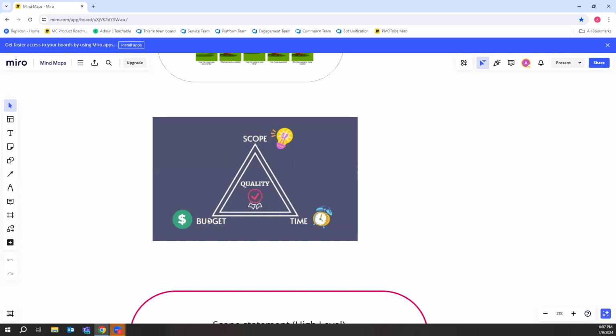Right? That was the scope of the project, and that was not going to change. What happened then was, with all the findings and all the complications they had, the budget increased. I think it was about 9 times more than what initially was estimated, and the time increased by almost a full year. Right. So that's a very good example of a very traditional project that you cannot do any other way. It really has to be all or nothing, because you can't build half a track and then let a train run on it while you build the other half.